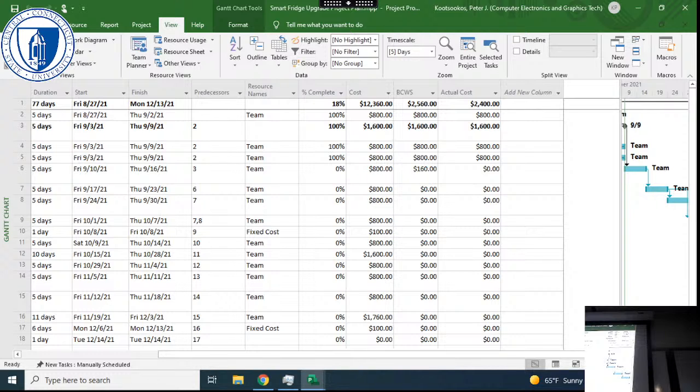If it's greater than 1, then you're either spending too much or you're behind schedule, or both. If it's less than 1, then you're ahead of schedule, or you haven't spent as much as you should have at this stage of the plan. What I'm going to try and do for next week is update both of these, and the third one, to reflect that.